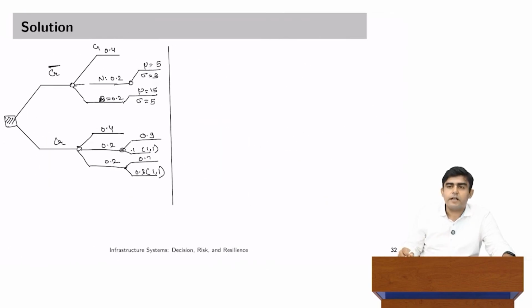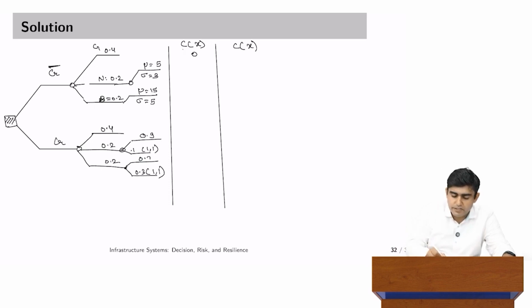This is the diagrammatic representation of entire information. Then I would talk about Cx, that is cost just because of delays plus launch of crash program. And again I would have another column where we will do all the calculations. When weather is good, no crash program is launched, no delay costs are involved, everything is on time, which is great. And we are not talking about profits here, because profits are the benchmark. It is the reduction in profit that we are talking. So benchmark cost of delays are 0.